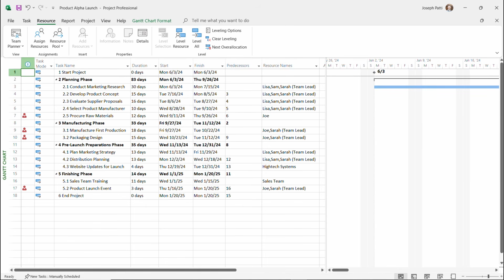But before that, let's take a look at when this project is planning on ending. January 20th, when I level it, it now pushes it back by 2 months. I can use this information to say, hey, listen, maybe I can work 75% of this and see what happens.